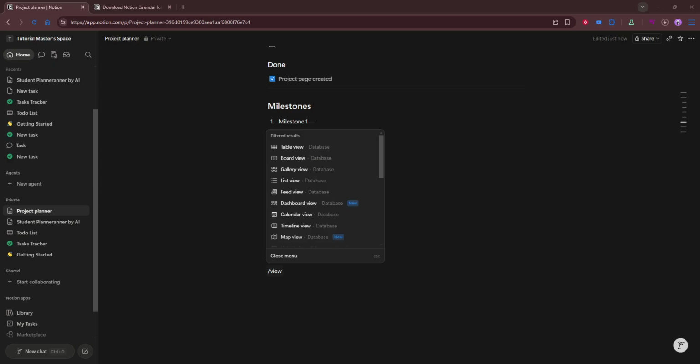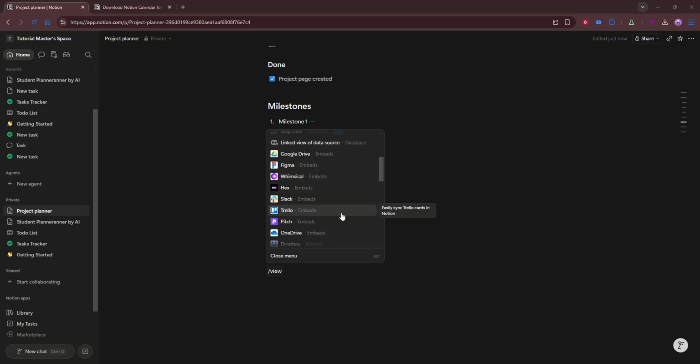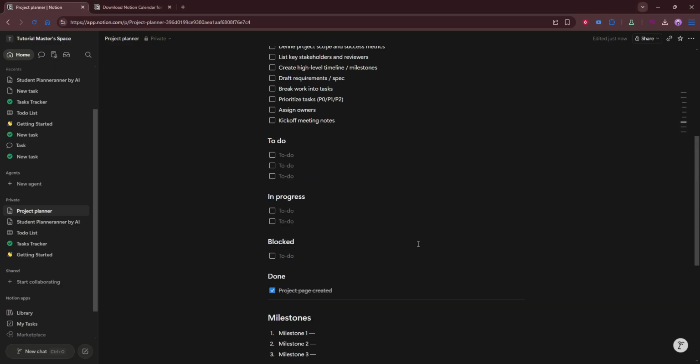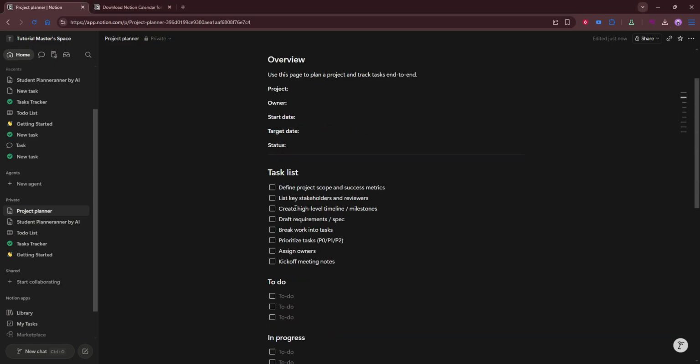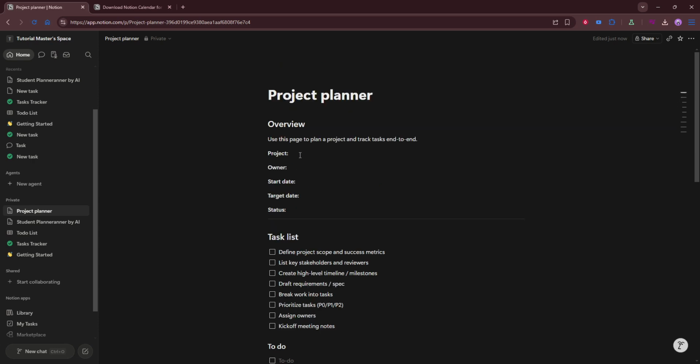After that, assign owners and due dates to your tasks. This step is essential because it creates accountability and makes priorities much clearer. When every task has a person responsible for it and a target completion date, the project becomes much easier to manage. As work progresses, keep updating task statuses so the project reflects what is actually happening.